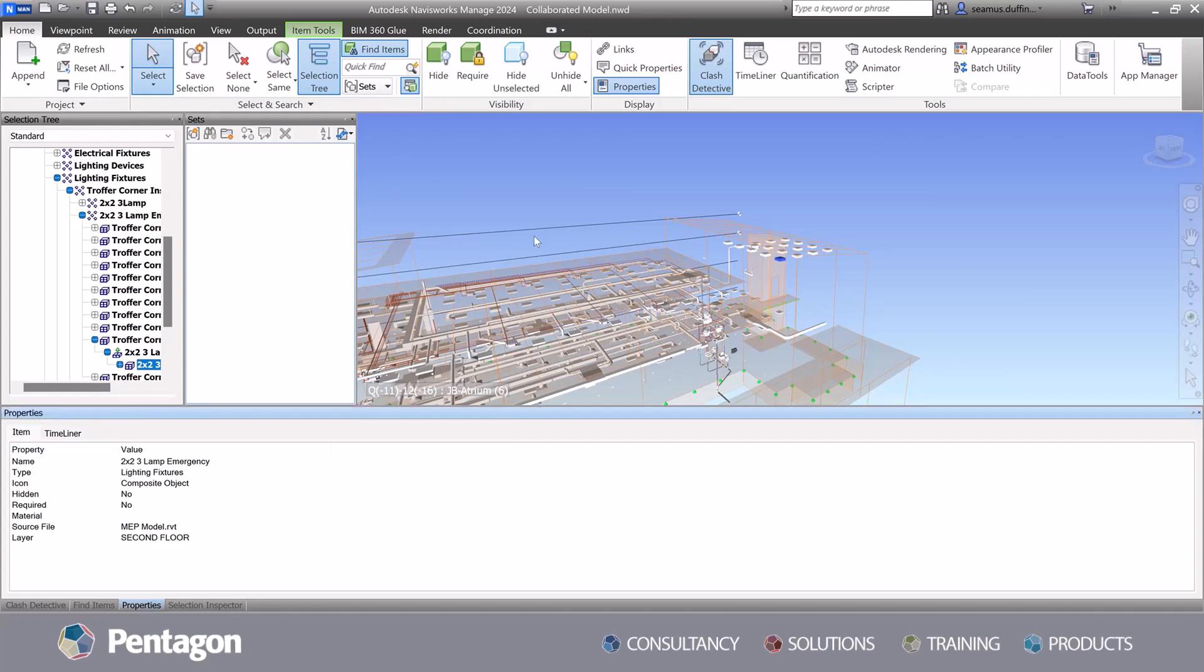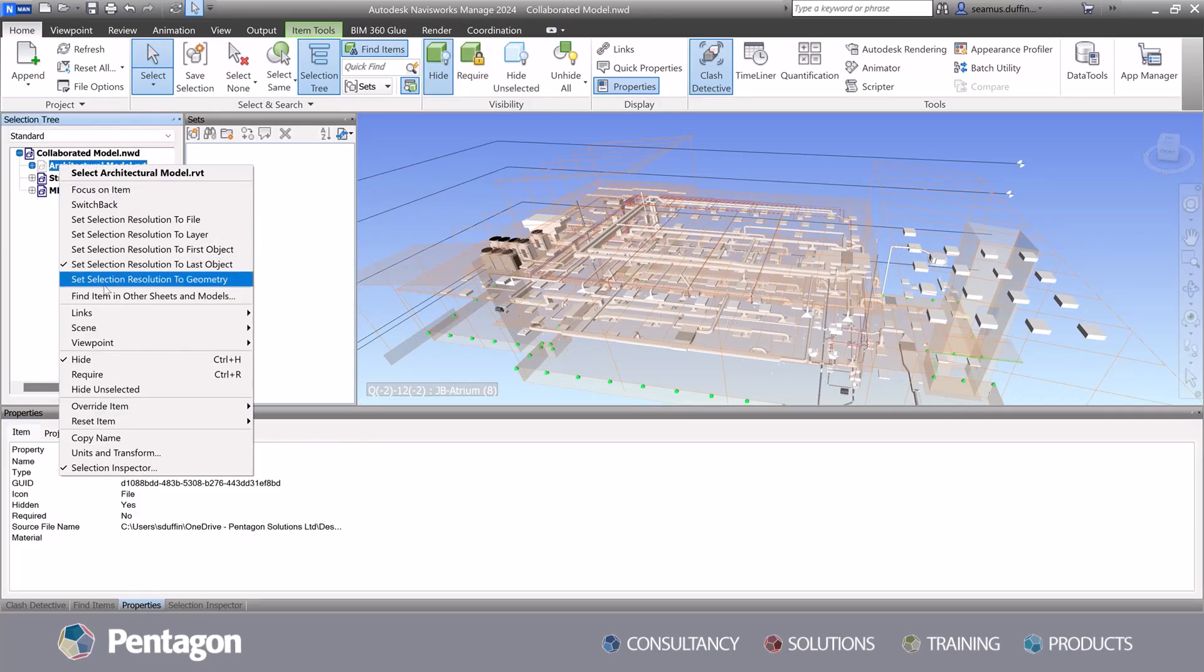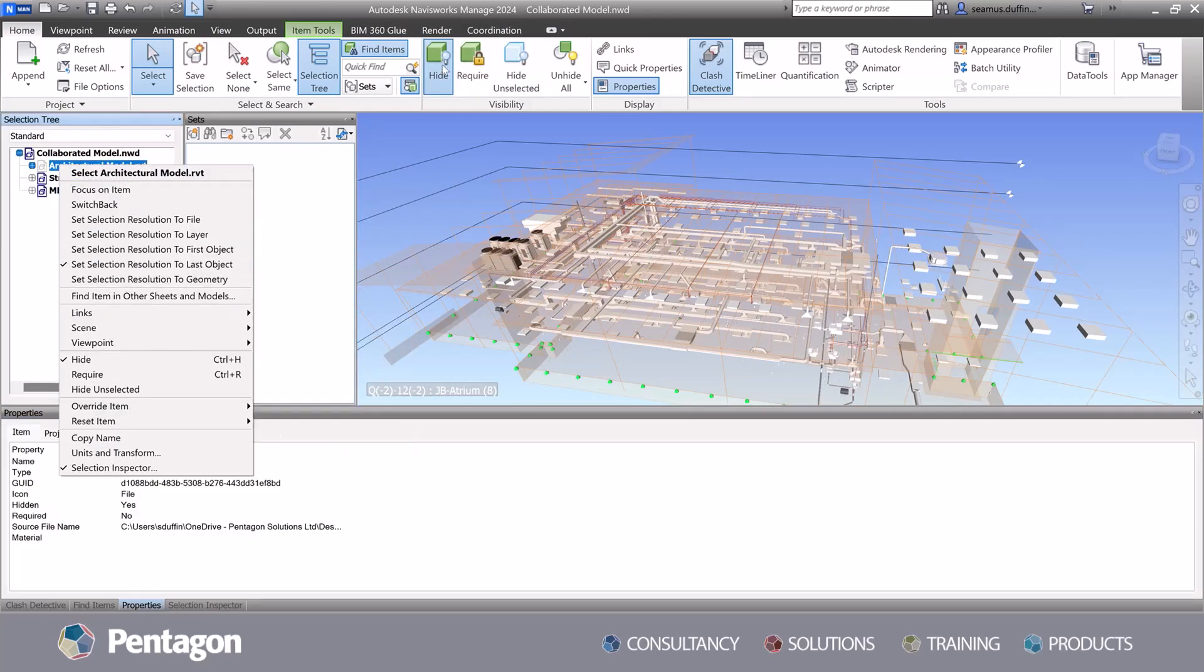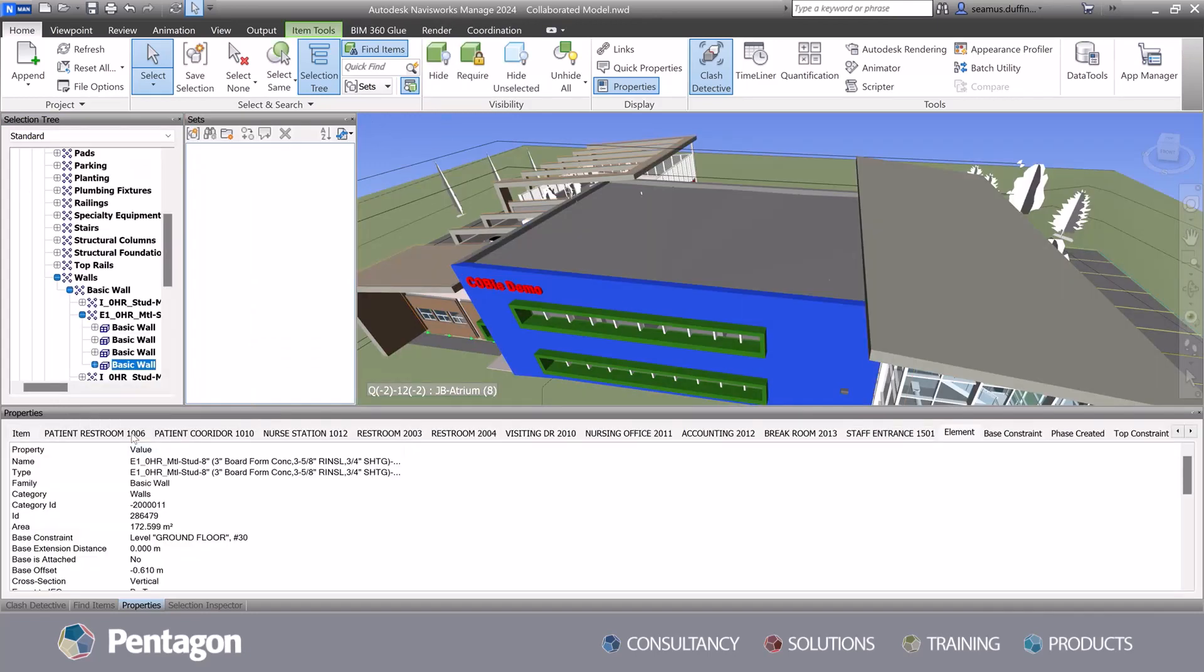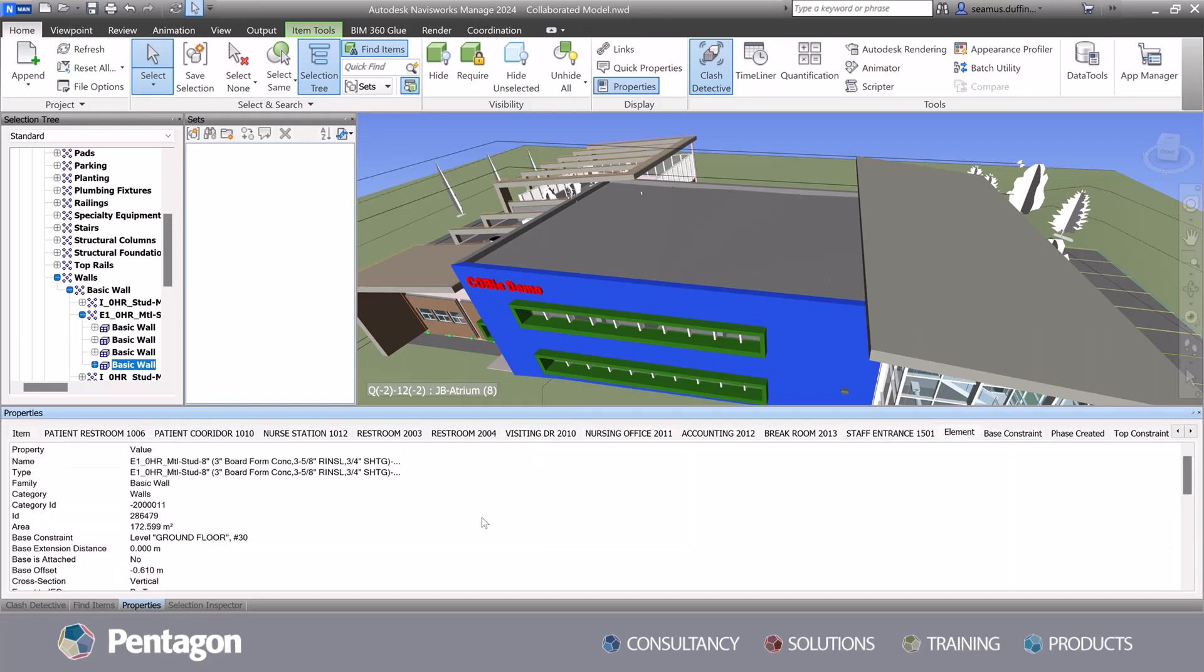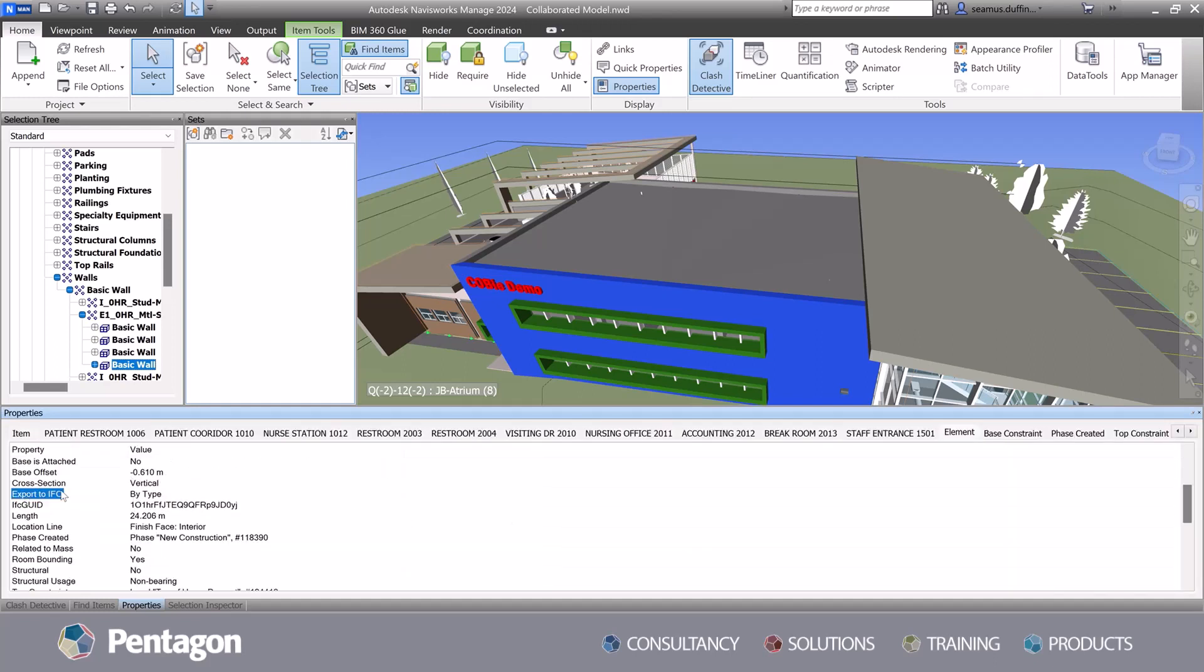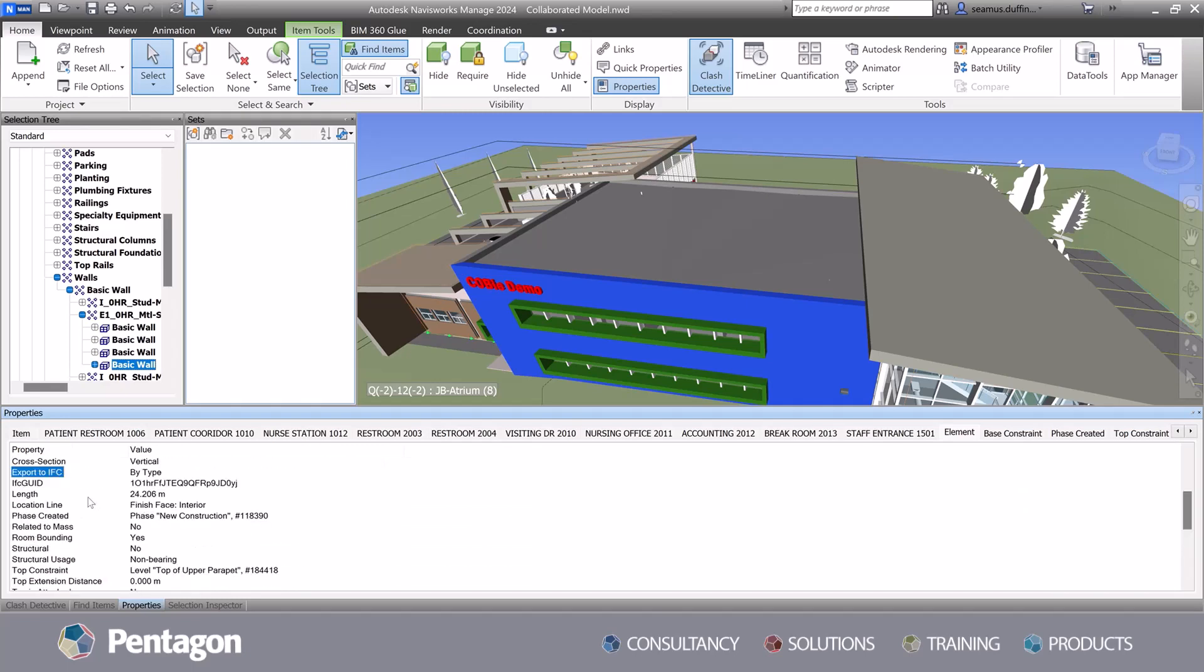By analyzing the data attributes associated with various building elements, Navisworks can identify clashes and conflicts within the models project. This allows project teams to resolve clashes early on, minimize potential issues, and avoid costly rework during the construction phase.